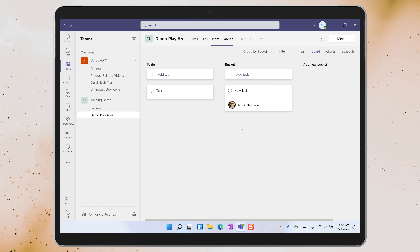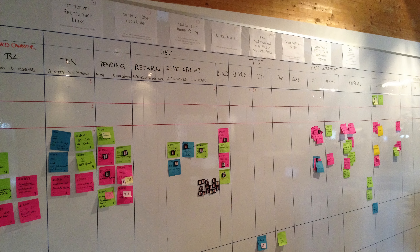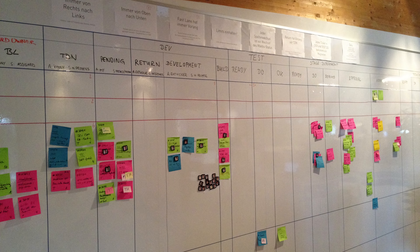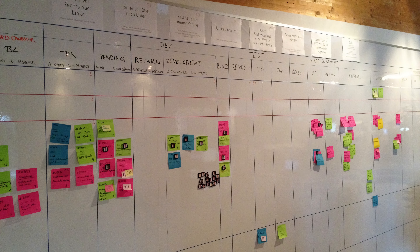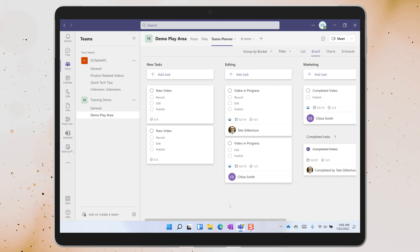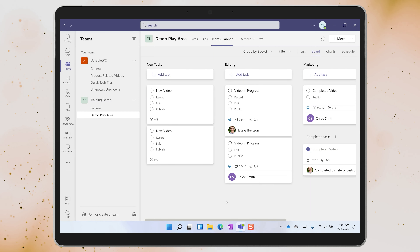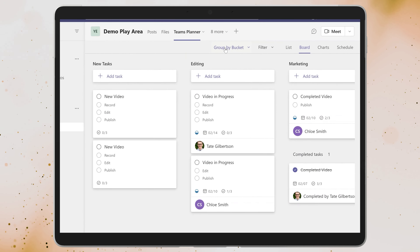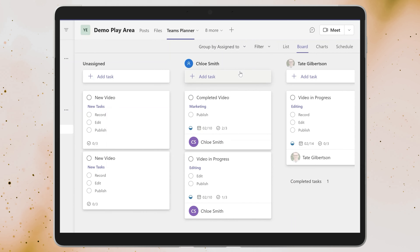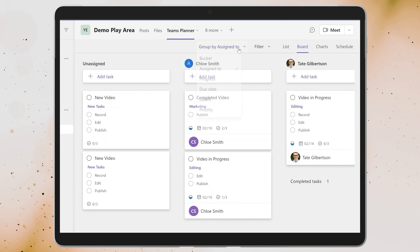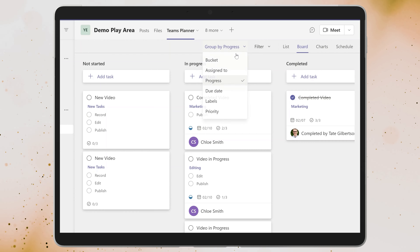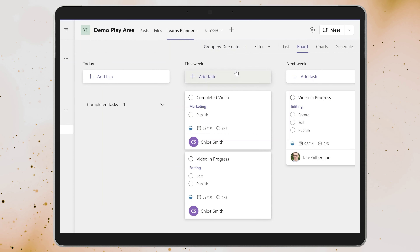Tasks in Planner sit within buckets. You can create new buckets and use this default view to see an overview of the tasks sitting within each bucket. Drag and drop a task to move it into a new bucket. Think of it like a digital Kanban board — the buckets are like workflow categories.